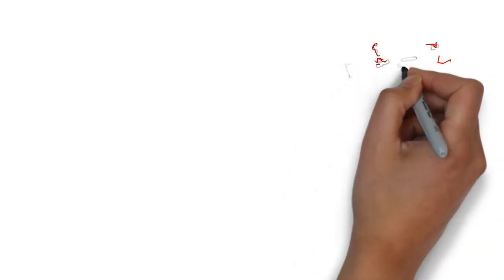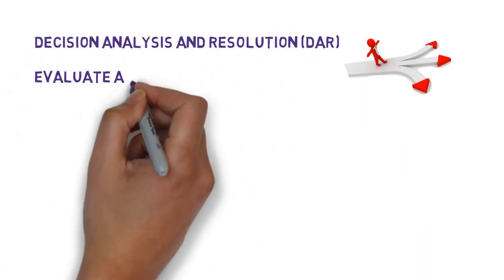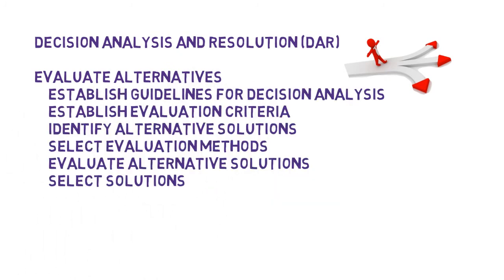Most project decisions can be handled by the project personnel themselves, but sometimes it's helpful to structure the decision activities to make a more objective choice based on agreed-on criteria. For example, when a project incurs a major risk, it can be useful to bring stakeholders together to collectively decide on the best way to recover from it.